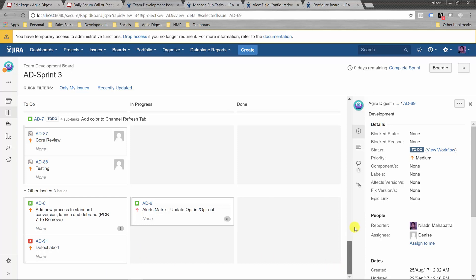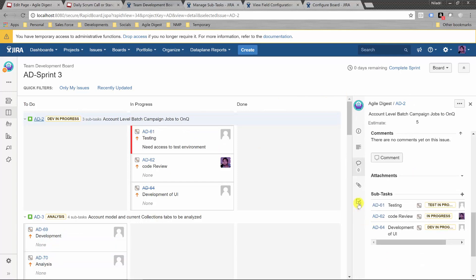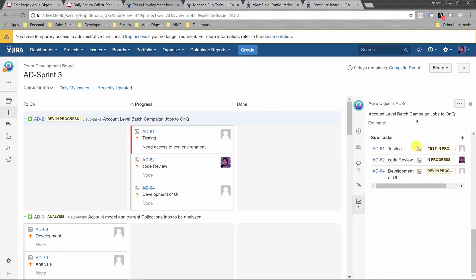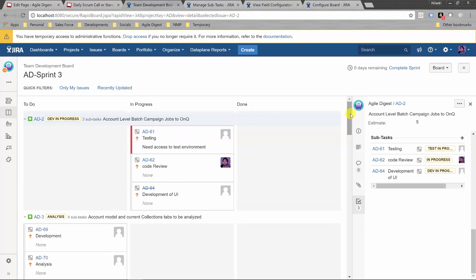If you want to create something under a story, you can see the subtasks — those are all subtasks and activity related work. If you want to have a bug or defect visible under a story, you need to create another subtask type — that will be a 'sprint defects' type. Normally, defects are created parallel to a story, but we need an issue type for defects that should be a child of a story. To do that, we need to create a custom issue type.